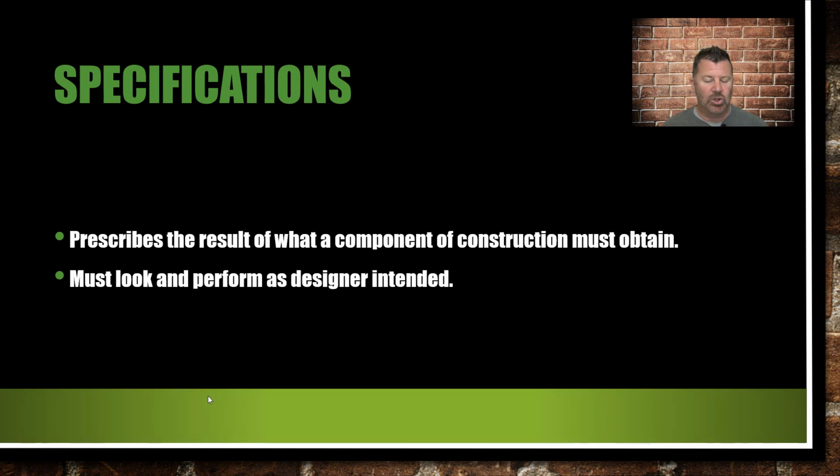Why did you specify that, Mr. or Miss Landscape Architect or Mr. or Mrs. Landscape Designer? Can you please tell me why? We'll put it there, but I'm going to put a clause in my contract to you that this plant will not work in full sun, therefore we're not going to warranty it. It's okay to question it, and it's okay to educate your client on it. You need to have some of these group discussions. A lot of times, maybe on these larger projects, you may not get a chance to talk to the owner, but you can at least talk to the site super, the GC, or the landscape architect. You need to bring these things to light, guys.